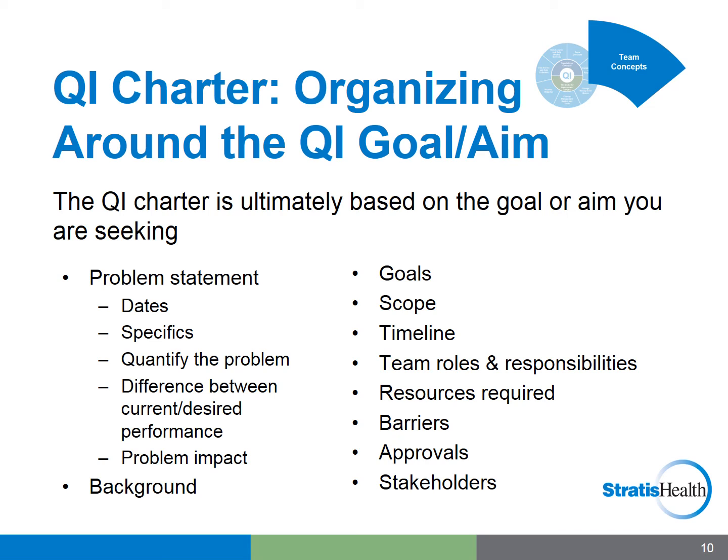The problem statement is a key element in the charter and should include the following: specific dates in which the problem occurred, or if it's an ongoing problem, specifics of the problem, quantify the problem, difference between current and desired performance, and impact of the problem on patients or the organization.